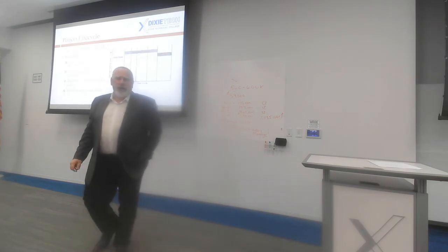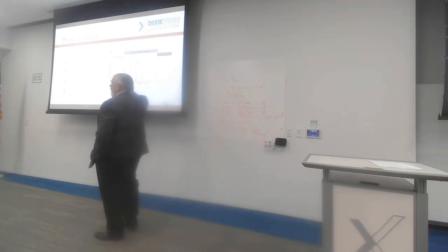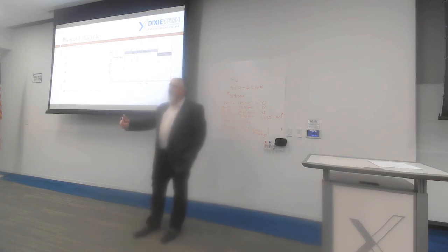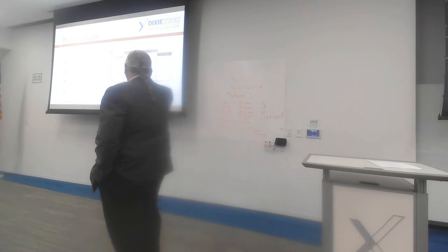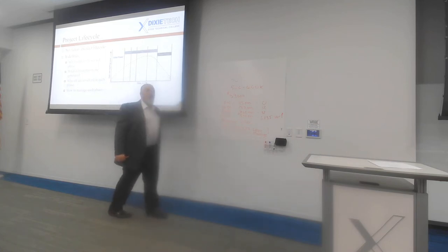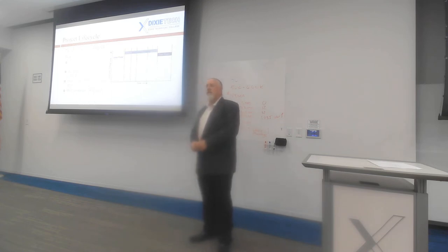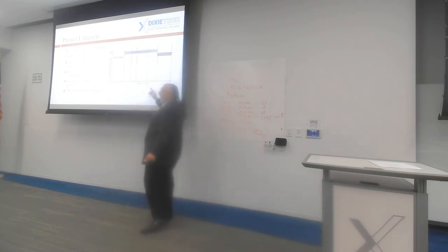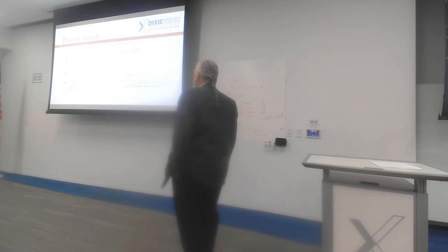managers. We talked about the project life cycle, and I had a nice little curve drawn on the whiteboard. And then it's necessary to go back and say, no two curves of a project life cycle are the same. All projects are unique and in their own thing, and so there's not a set model that the project life cycle has to follow. It just has a model where our cost and staffing level starts out pretty low. Our cost is low and few people on the job. As the job gets traction, we hire more people to do the project, and our cost gets higher and higher. And then as we close the project down, most of the trades are done, and people are starting to filter away from the project, and yet the project's still not done. But if you count the trucks on the job site, they become fewer as we are looking at the final sign-offs and the final inspections and things like that. The work itself is often essentially done. So every project has its own life cycle.